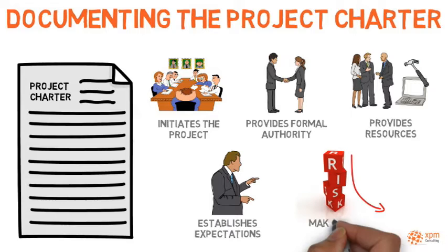Finally, the charter makes decisions to reduce risk. Although a significant part of the risk management effort is performed during planning, it is possible to proactively respond to risks during initiation. For example, if previous projects failed due to lack of engagement by some of the organization's functions, the sponsor may use the project charter to specify the level of dedication expected of each organizational unit.